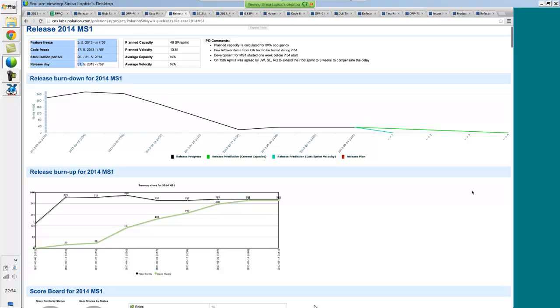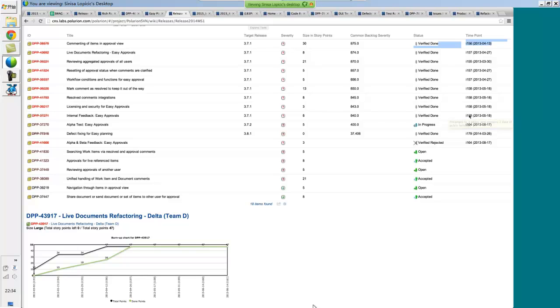Another important thing in Agile for us is not so much about estimations and progress, but also the number of user stories that are open, closed, or need to be somehow managed. The reason for this is that we want to keep a minimal number of user stories in progress, because that's unfinished work. As you see in the sprint and how we do that, to get more specific, we try to work on a minimal number of user stories that utilize the maximum capacity of the team. So basically, we ensure that the whole team is working in some kind of order on delivering by the end of the sprint.